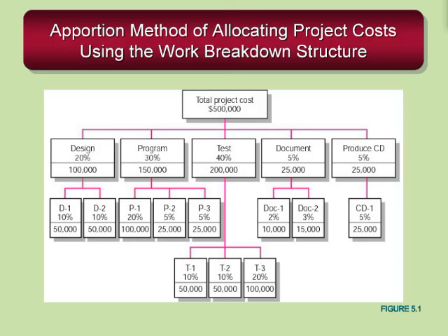So if you have a rough ballpark of a project total cost, or maybe you know one piece of the puzzle, maybe you know how long it's going to take to program this particular project but didn't know about all the other stuff, but your records show in the past that you're pretty consistent. If programming is 30% of your cost, there's where your other costs line up. So having a bit of the information gives you a really good first cut on estimating costs.